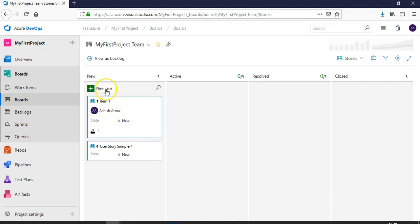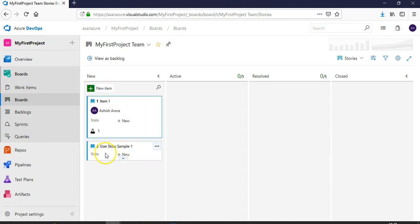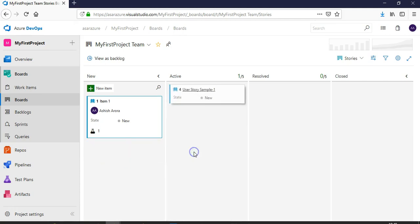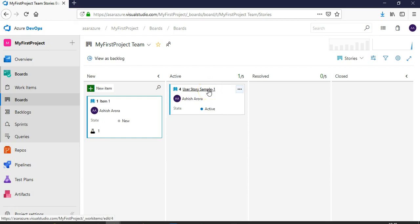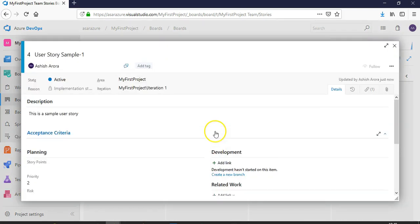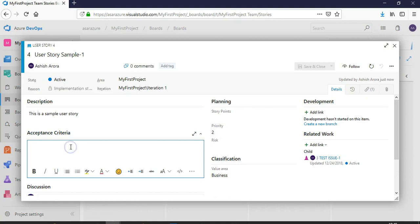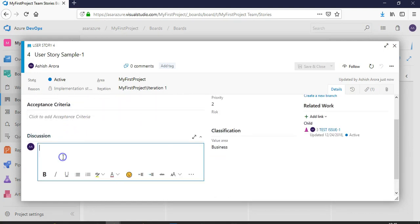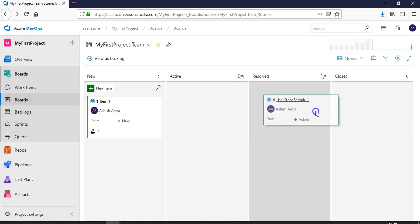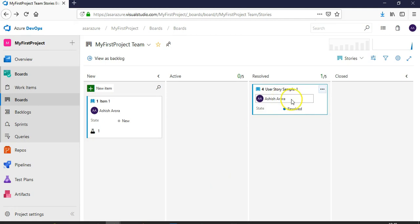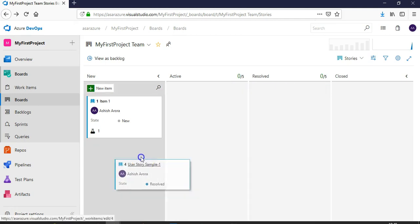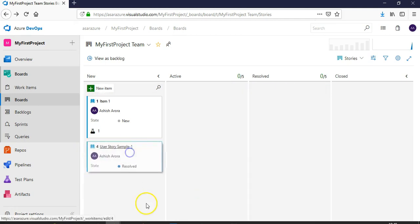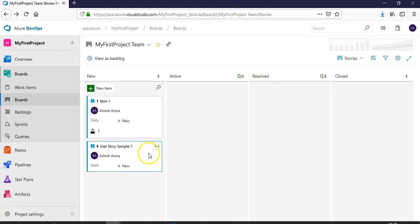Okay, let's say you are working on this user story and it is new. You have to change the status of this user story to active, then you will click on it and update your notes. You can add acceptance criteria, description, or discussion comments, and then you will move to the next section which is resolved or closed. Let's say it is a new item that we are creating here. If you click here, you get an option to add a test.